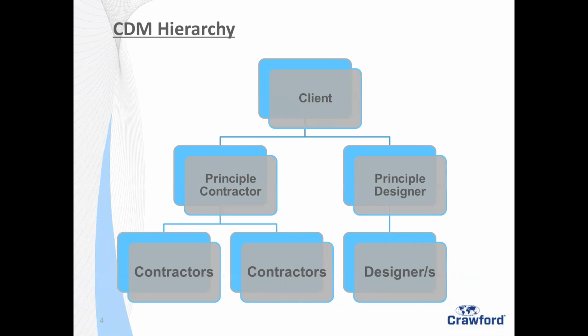Now, this is something that's brought up an awful lot in my realm, which is, when is there another contractor? Well, unfortunately, if you're not on the PAYE scheme of the principal contractor, you are seen as a separate contractor. Principal designer and designers will be, again, appointed in writing by the client.